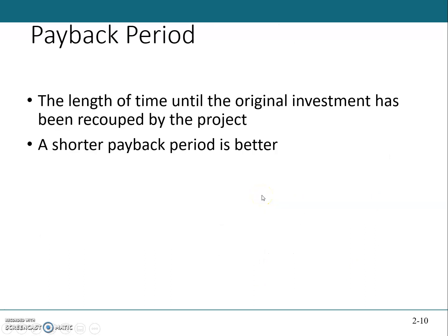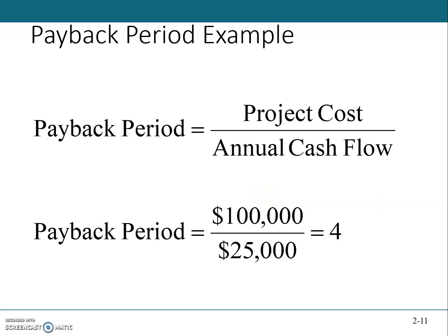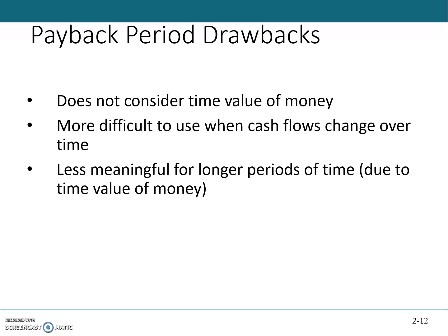This method assumes that the cash inflows will persist at least long enough to pay back the investment, and it ignores any cash inflows beyond the payback period. The method also serves as an inadequate proxy for risks. The faster the investment is recovered, the less the risk to which the firm is exposed. So these were the drawbacks.